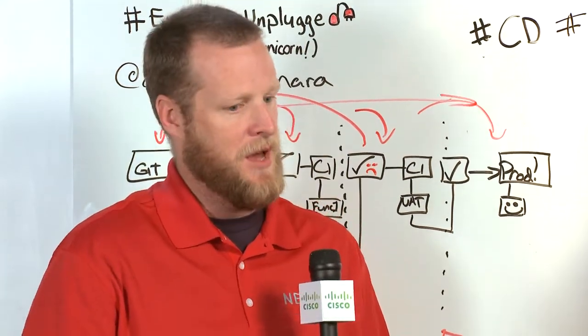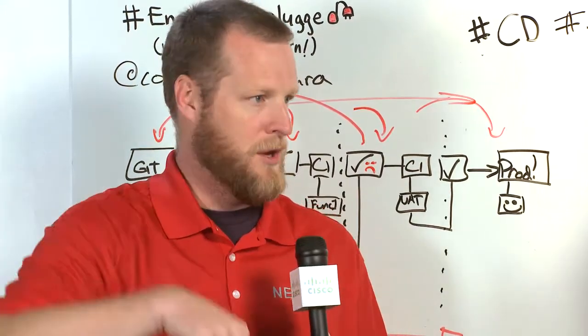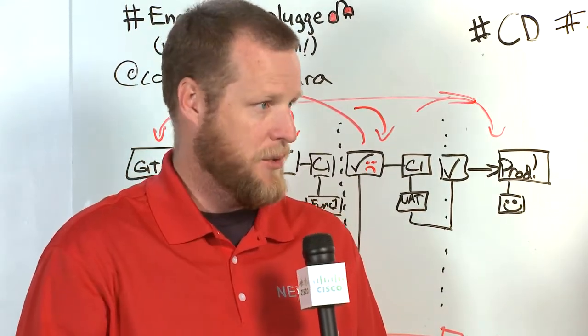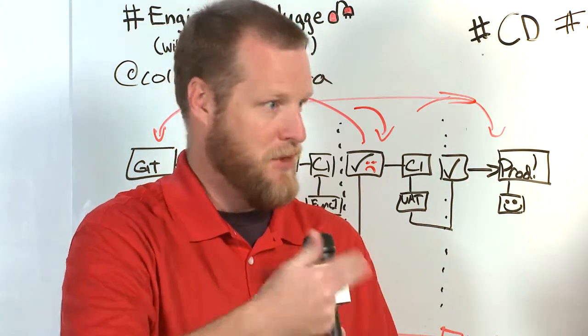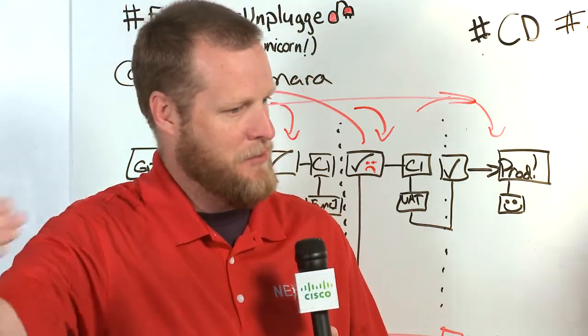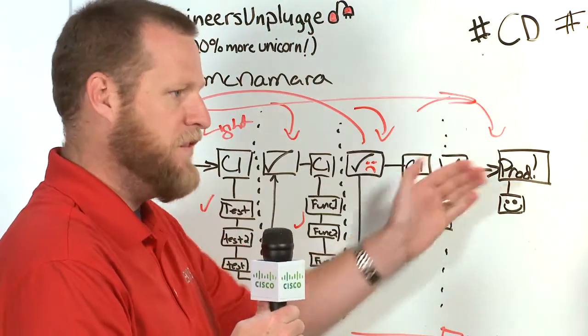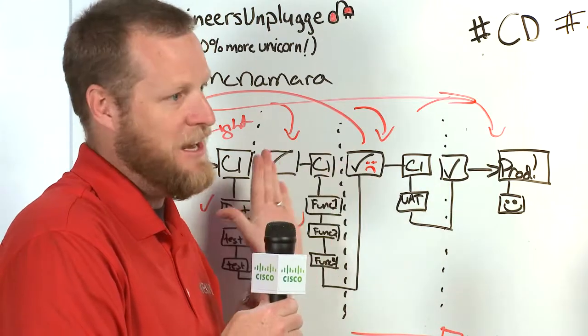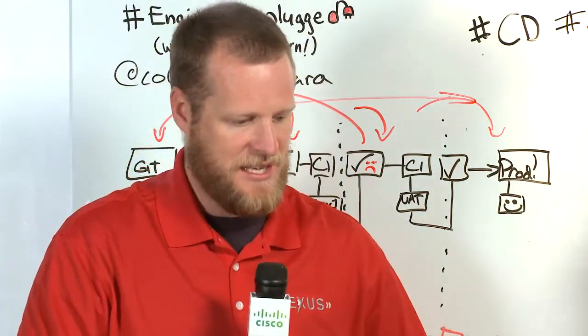So a common DevOps release schedule is, from inception to deployment, to do a two-week cycle, and then to measure the impact of that in the next week, and then plan, and then basically they go into months. It breaks into months, but they're 2 weeks of focused work. But what happens is you're pushing features in, you're gating features and work that comes into your team, and then saying we are going to release this every 2 weeks.